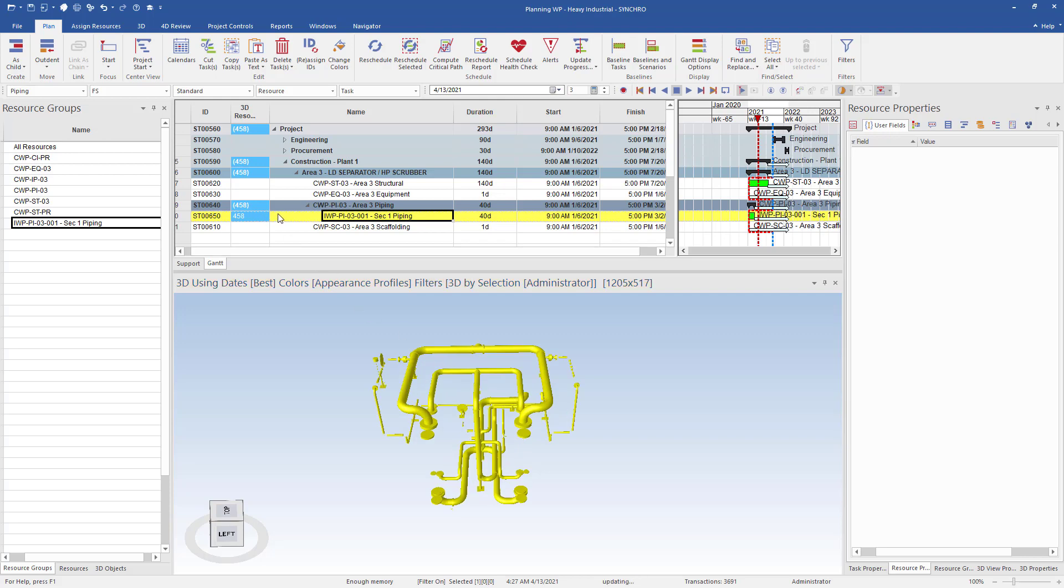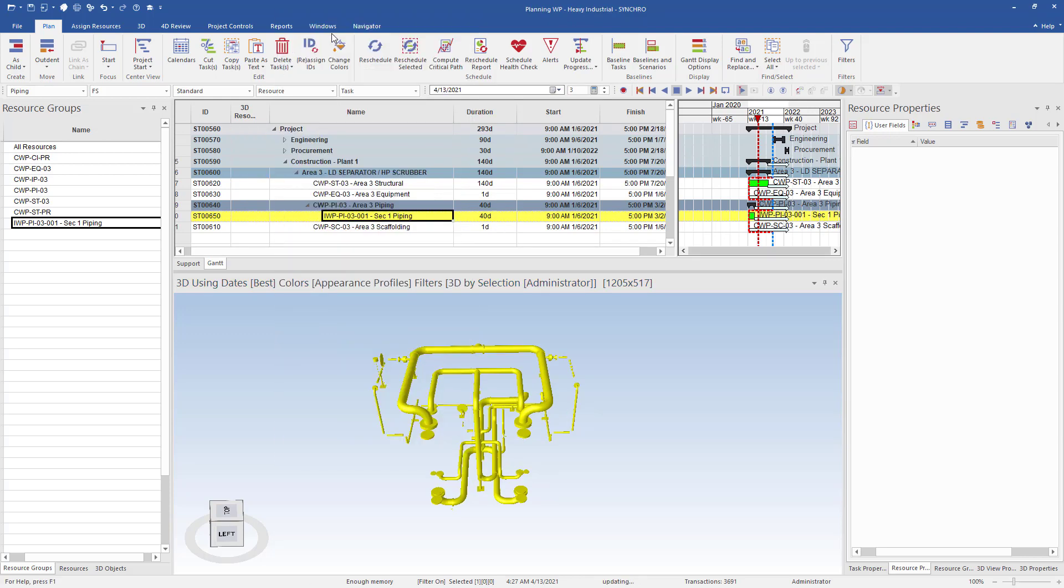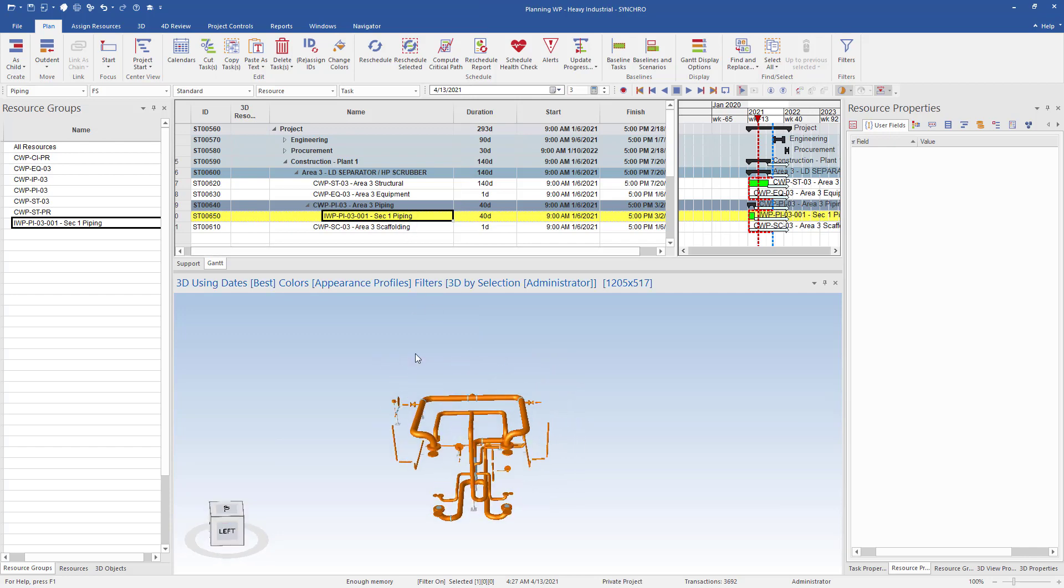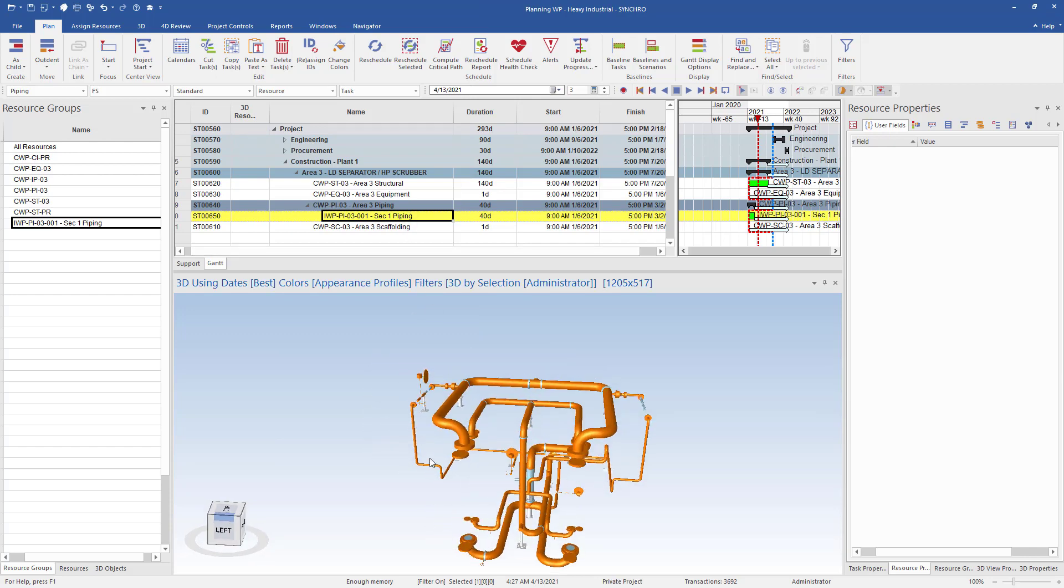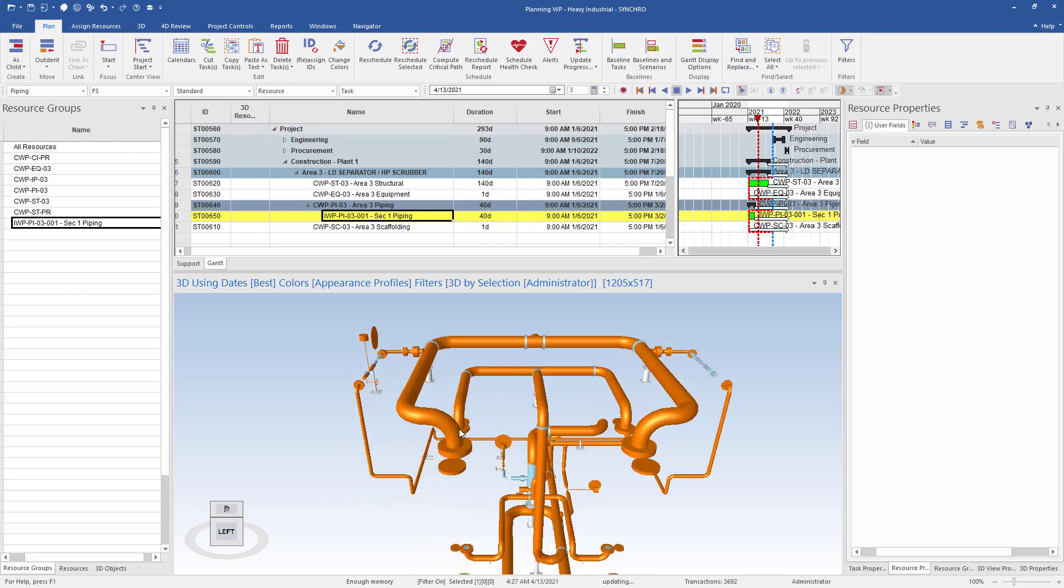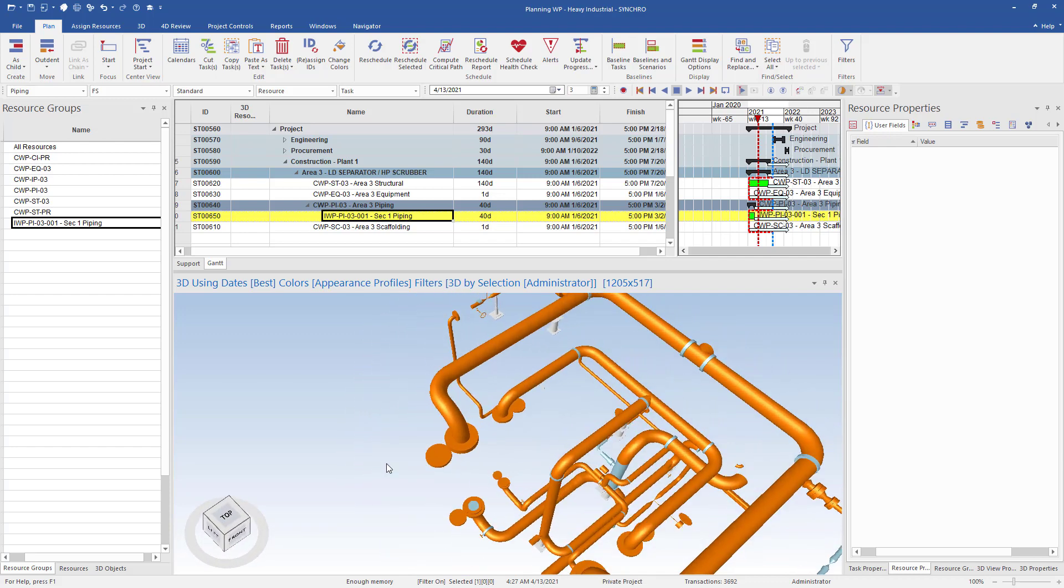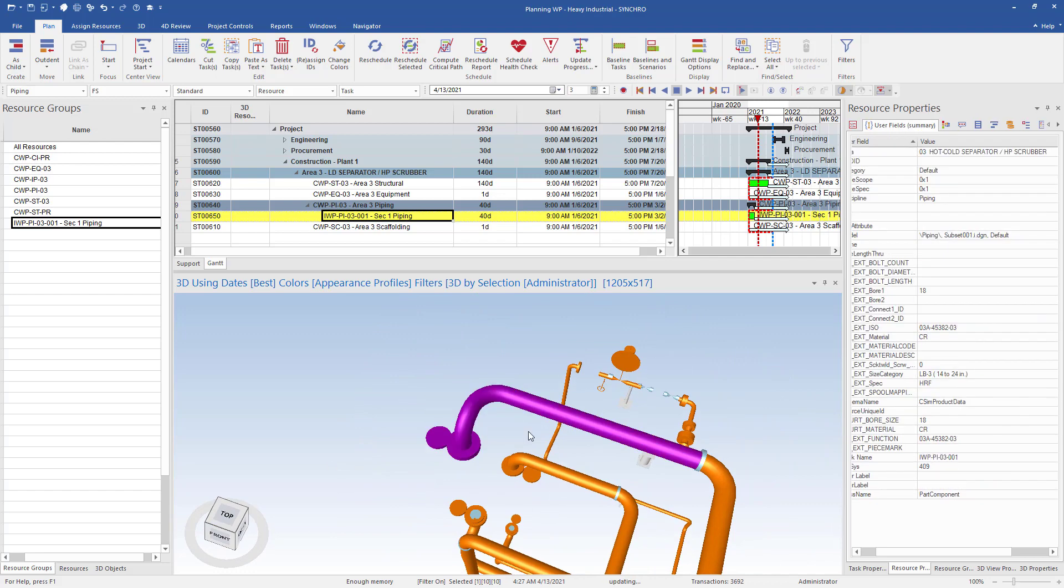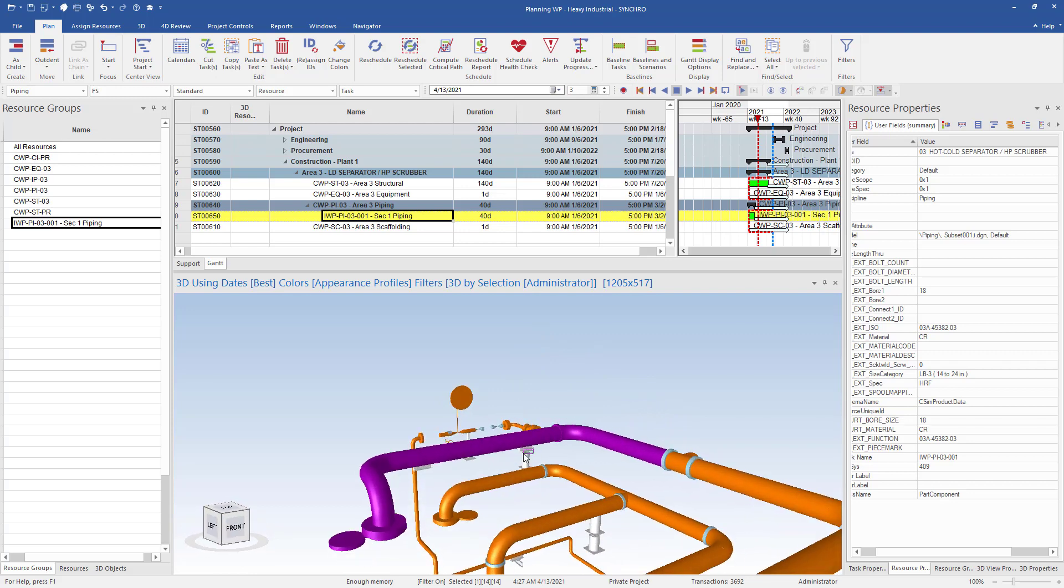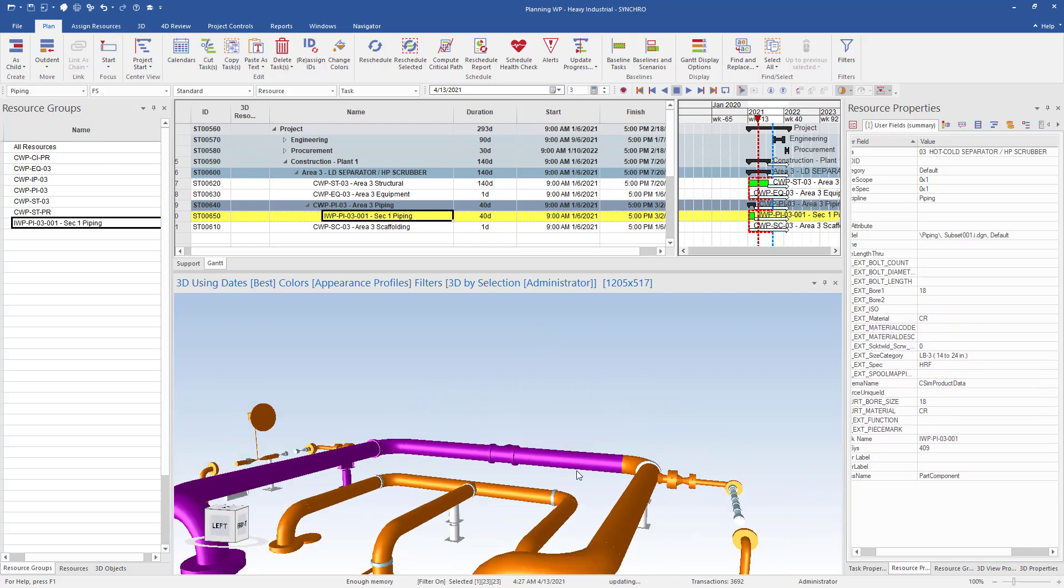This is quite a bit of piping associated to this one package, so we may want to break it down into smaller packages. If this is the case, we will want to unassign the resources from the task we just created and create new smaller packages. We will still have this parent task, but now we will want to create the smaller packages by selecting the piping required for the package.